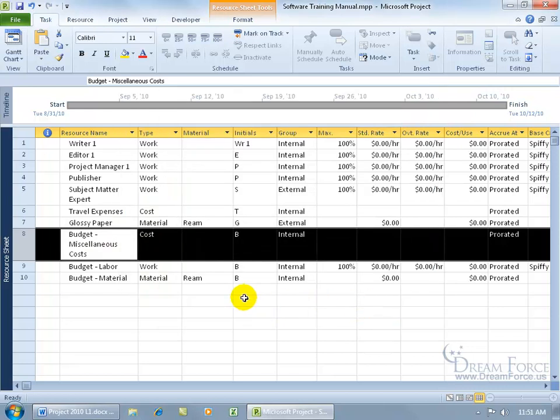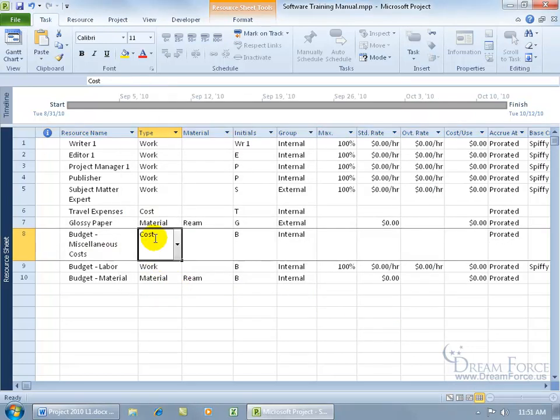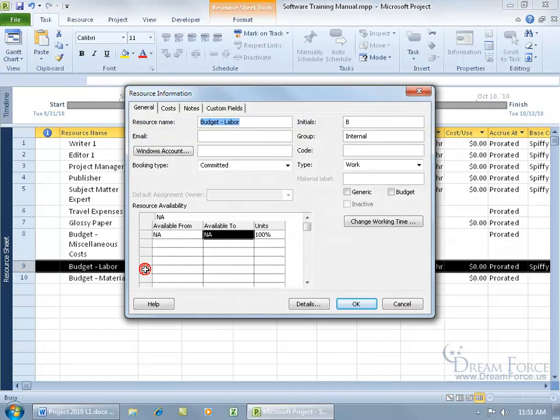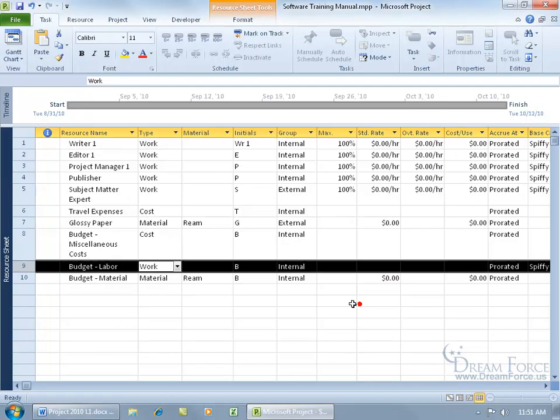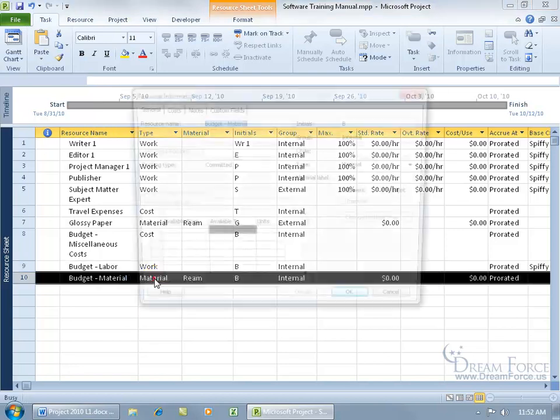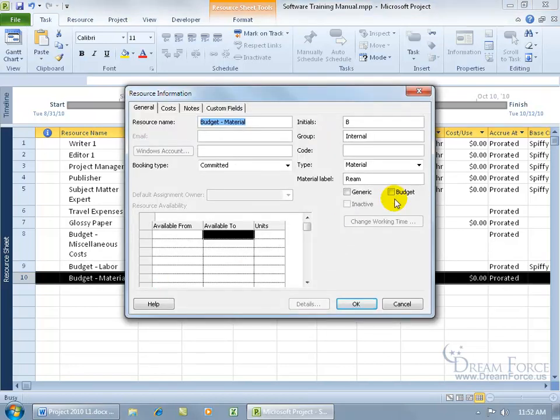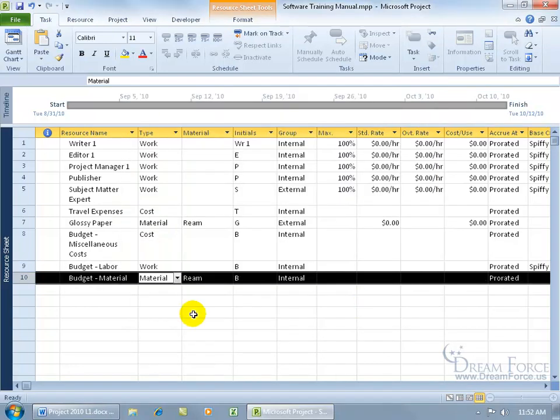And it will convert that to your budget cost resource. So now it's not a resource that is going to be costing you money. It's now because we have it checked, it's the amount of money that we want to set aside for the cost resources. Then we can come down here, double click on work. There's our budget. Click ok. Then we set aside for our work resources. And then materials. Go ahead and check it. And click ok.